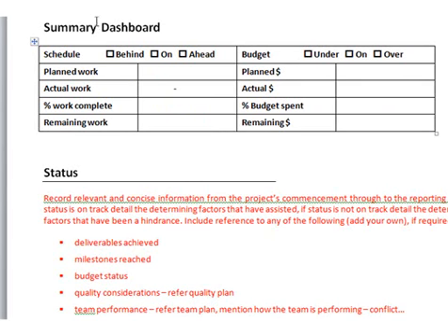Okay, we now move down to the summary dashboard, and the most important thing to know about this is we're doing this performance report at a point in time where the project is still running. So if your project's actually finished or technically finished, you don't do this report at the finishing point. You're going to have to pick a point back in time and discuss the issues of your project at that time. So if your project's finished, pick a date where you can easily remember what's going on. This might be when the project was halfway through, 80% through, 90% through, whatever suits you, but just pick a date where the project was still running.